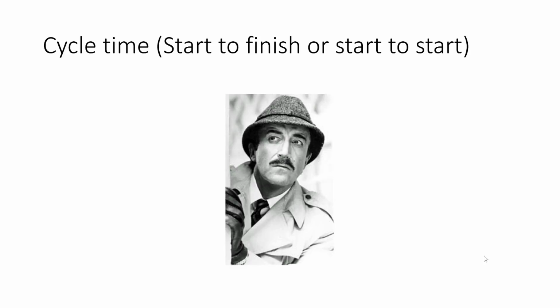Another thing that you have to be careful about defining is what is the system that you're talking about, right? In your organization, you may have a requirements phase, a design phase, and then a development phase and a testing phase. And one person may see requirements and design as kind of the same thing. So when they're tracking cycle time, they're actually saying both of those things. And when you're saying cycle time, you're saying something different. So you have to be sure you're comparing apples to apples. So be careful with cycle time.